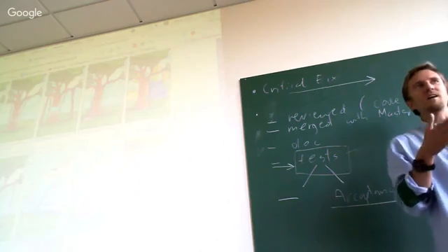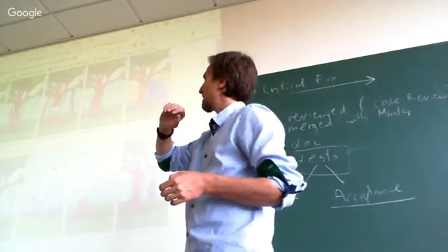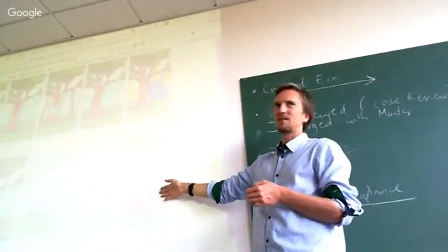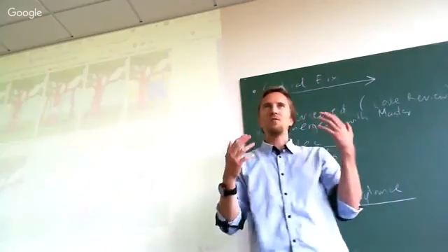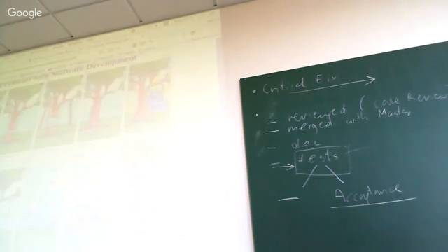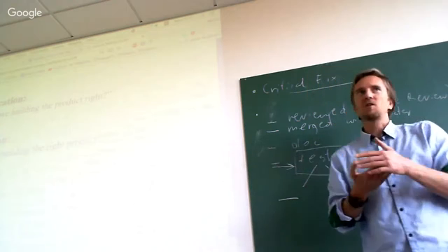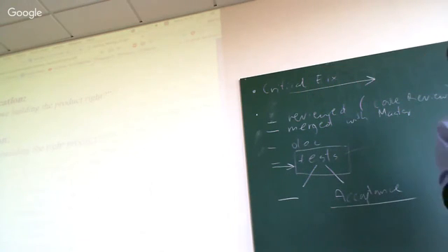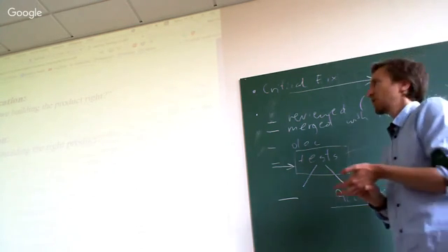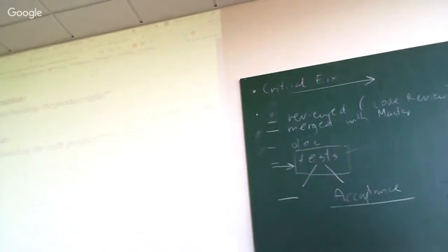There is a communication failure at different stages of the project development, right? So you may have what the customer really wanted, and how different people at different stages misinterpreted it. So verification is to make sure that whatever was in the spec is actually executed. So it's sort of like there are no bugs, in a sense. But validation is we have to make sure that we're actually delivering the value to the customer or to the product owner, and we're building the right thing, right? We can build a thing right, but it might not be the right thing, right? So that's the point here.